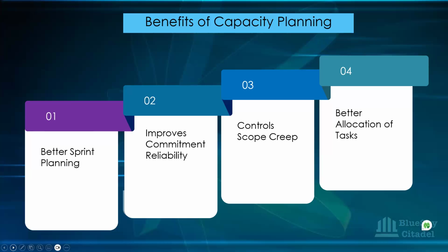And then there's a negotiation to say, okay, the effort to do this new one you're bringing in, let's assume the effort is 5. Can we also take out low priority work that is 5 so that we can accommodate this one? So you're using the new one and removing the previous low priority one to bring in the new one, because it's still based on capacity.